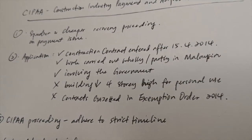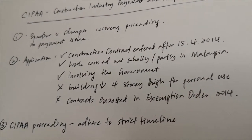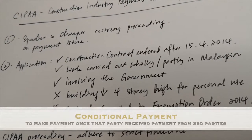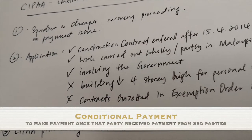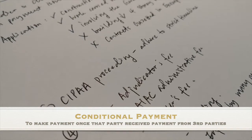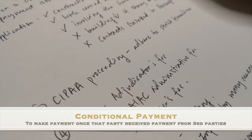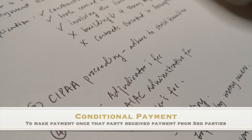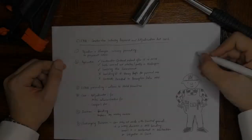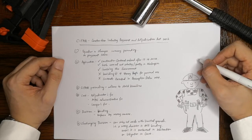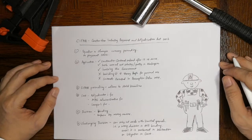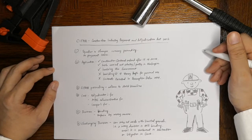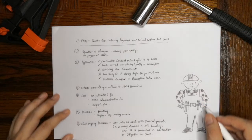It is our experience that adjudication under SIPA can be very effective, especially with contracts that have conditional payment provisions such as pay-when-paid or pay-if-paid clauses, as such provisions do not apply to SIPA adjudication. If you are in the construction industry and have payment issues, we hope this video provides a quick rundown of what SIPA adjudication is and how it can help you.